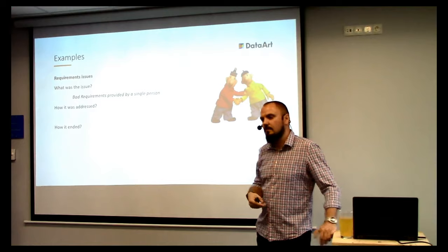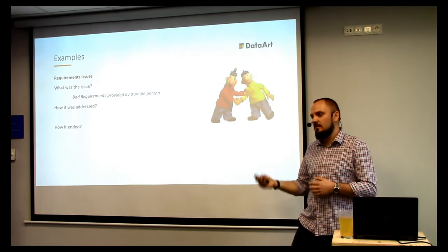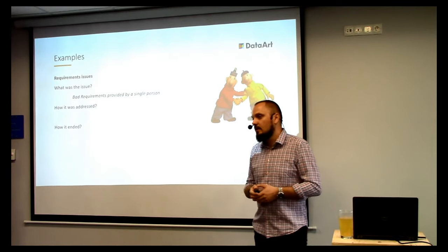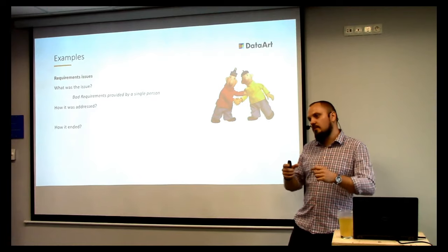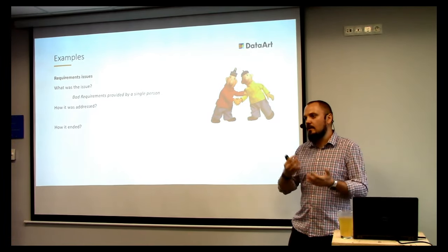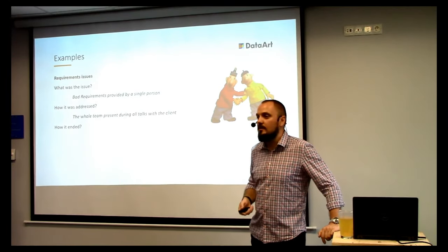Because if there's only a single person, he can sometimes understand it a bit differently than you will, or a whole team will be understanding it differently. So he was writing something, and for him it was good. We couldn't get the idea if it's okay or not okay. And at the demo, we found out that it's not what the client wanted.